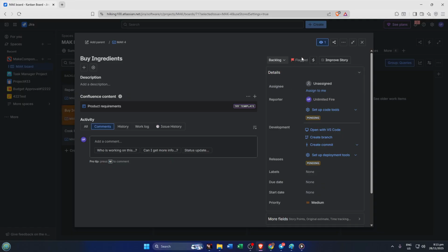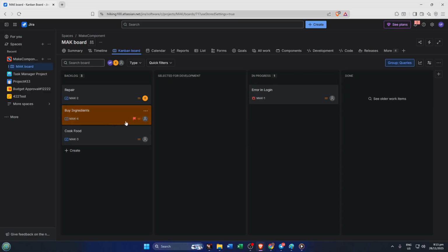The user story's card will brandish an eye-catching red flag icon, a silent but powerful signal to your team. Plus, the card itself will often light up with a yellow background on your Jira boards. That's because Jira is making sure that it screams for attention among your other tasks. A flagged story indicates a task with a problem or an impediment, helping your team to prioritize their work and to discuss possible solutions in your stand-ups.